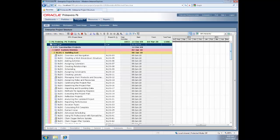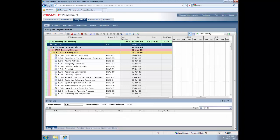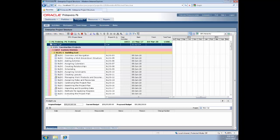The new project is created. You can see in the enterprise project structure it's sitting where we wanted it under P6 training - there is the new folder. We could add some detail to it at this moment; we could give it the budget, so we said our budget was going to be 50 million. You can see against the project folder there's a little sunshine symbol - that means we haven't yet saved the data. In the web you have to save the data, and you do that by means of the floppy disk icon in the icon bar. Unlike the client or P6 Professional which saves automatically, here you do need to come in and do a positive save.